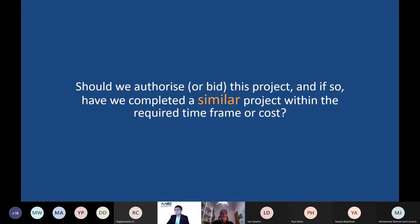Questions like: should we authorize or bid this project? Have we completed a similar project within the required timeframe or cost? For example, if a client says you have two years to deliver a project and a budget of $400 million, the first question is: is that realistic? When you compare this to all the data you have in your organization, you can decide whether to go ahead and bid the project, or as an owner, whether it makes sense to sanction it.